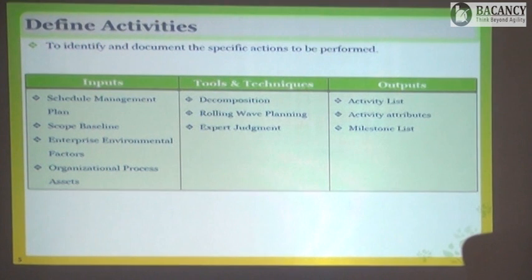No. We are going to identify all the pieces of work that can be completed by going there. And you will be able to identify that only when you have defined activities for each of the work packages. Then you find out, okay, we need tomato for this, this, this and this. We need spices for this, this and this. So what you do is, you mark those activities as the ones which need to be run in parallel. So this is for your example of address control also. Correct. This is for that also.